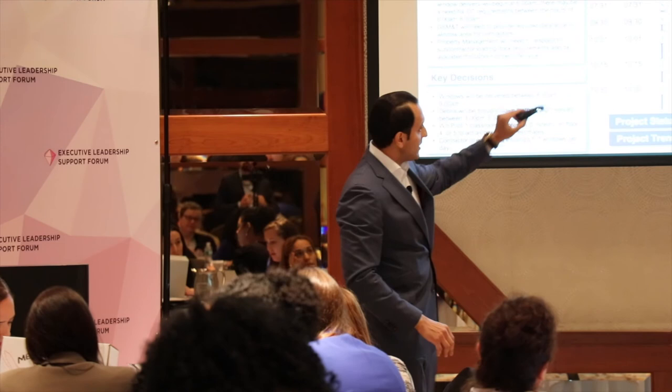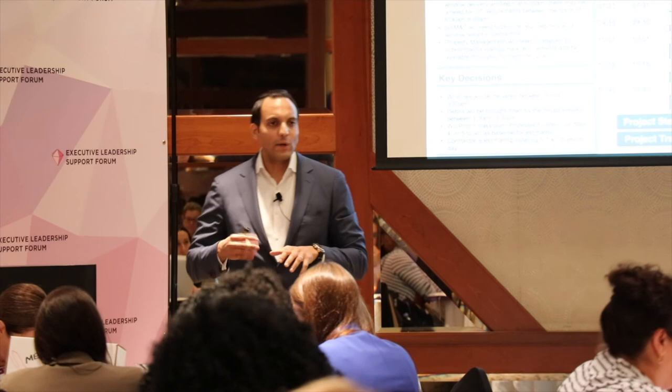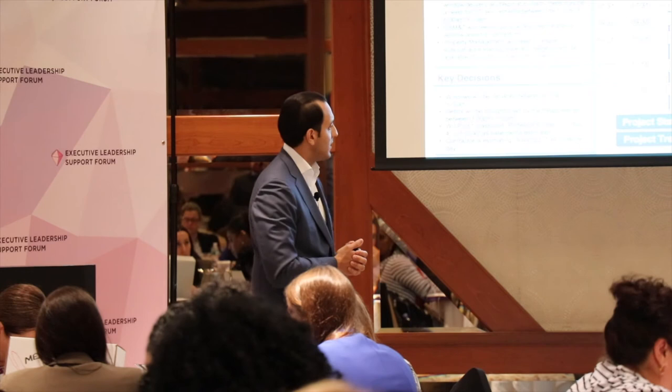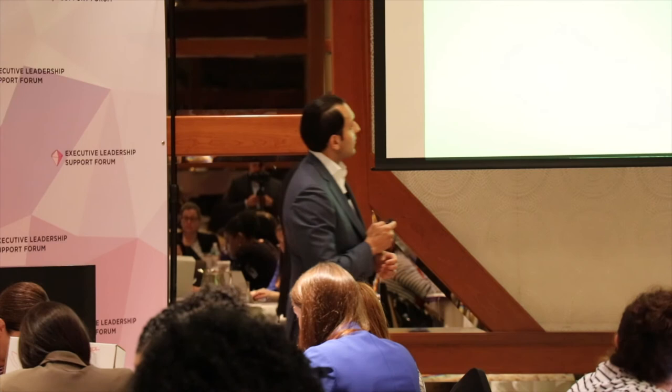And this, remember the milestone poll? So from top to bottom, these are the key milestones that are coming up all the way through your go live. And then you have your color code in terms of where are you now, red, yellow, green. And then your trend that I like to do within the next two to three weeks or two to three months. If you're trending yellow, right? Are you losing some resources? Do you need some money? You gotta throw some more money at the problem? That's your trend status. All right, again, we will send you the deliverable for that.